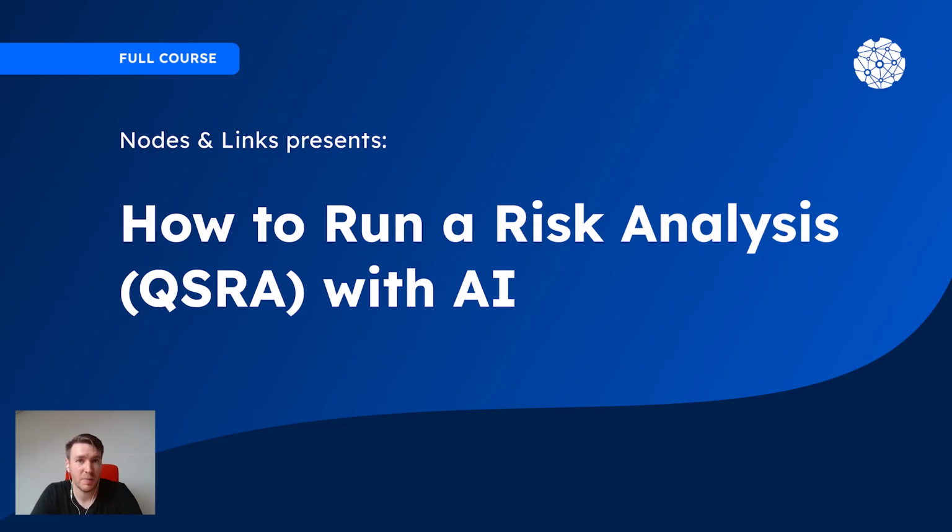So this final section is just a bit of advice from me to you on how you can leverage the system to look great in your project. I've got 4 pieces of advice. Number 1 is if you're running a risk workshop, you can use the AI components of the system to take a view on the uncertainty before you even walk in. What that means is that you'll already have triggers for people to go off. It's much easier for people to say, well, I don't think it's that, than it is for them to create numbers out of their head. This shortens the time to run the workshops, and it also means that you can get to more specific answers faster.